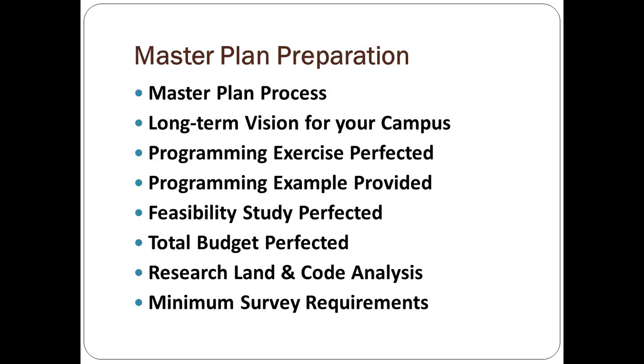I've been told no more than 6 months old, but ask your architect and your engineers, your construction team, what they need, and let them communicate with your surveyor so that everything is given and it's done correctly and promptly. Then they're going to base their work of that master plan and your first phase from that master plan on that survey. This is something that, as far as I can see, and I've been all over the country, is required basically everywhere you go.